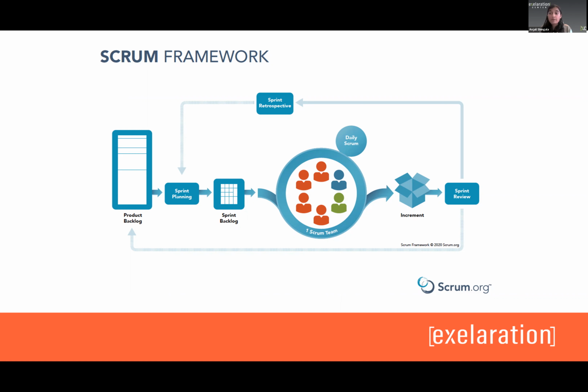I worked for a client whose clients needed extra time and needed many tutorials for any changes that happened. So as opposed to sending out tutorials and documentation for every change that was made, they preferred to do that every couple of months. That way they could take the lift all at one time, as opposed to saying, here are 3 feature updates. They would prefer saying, here are 30 feature updates. It's a big version release for them. So there are many reasons why you could want to do this. But the goal is that it is a potentially shippable product at the end of every sprint.